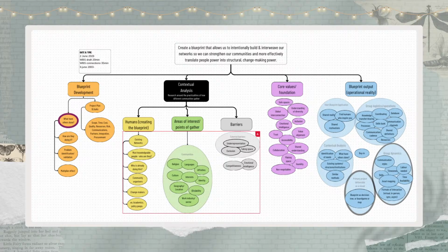I think sometimes that is, at least for me, the difficulty of making sense of this portion of translating the brainstorm into the structure: not every single thing that we thought of needs to be part of the high level detail, because a lot of the things that come up during brainstorming are low level details that are captured in the process but don't necessarily belong in the high level structures that we create.